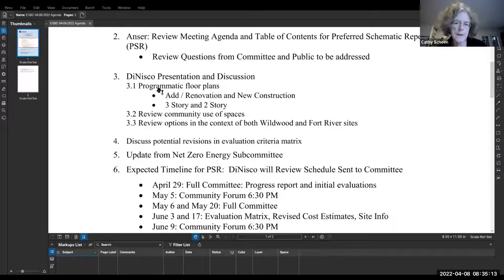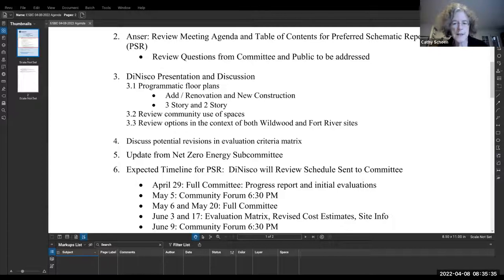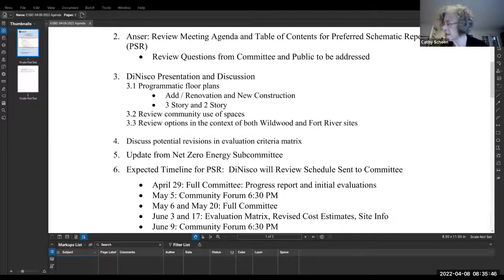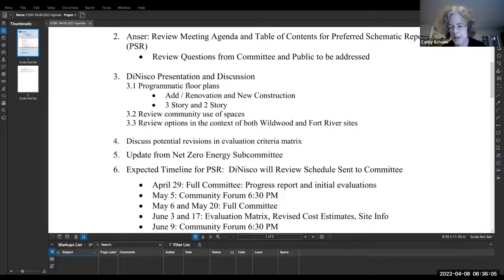I think the only thing is that when we sent out the minutes, we've been collecting comments and questions people had. A couple of members of the committee and members of the public asked: will we be seeing the detailed information sent to cost estimators, and will we be seeing the detailed cost estimates? At this stage, we will. The estimates for the preferred option will be sent to two cost estimators and we'll get quite detailed back. I wanted to make sure people know that information is coming, and the minutes are collecting comments.